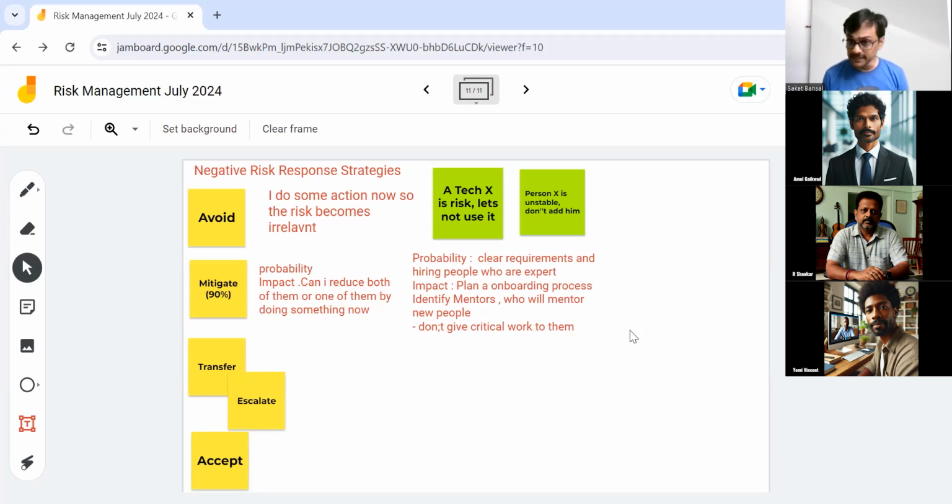So maybe a team building, team collaboration, we can mitigate by organizing team building activities. We can say, let's do a team building activity and plan for lower productivity in the beginning. Yeah, because the team will go through a productivity fluctuation. That could be a strategy to reduce the impact of the team's poor productivity on milestones. That's initial poor communication on milestones.